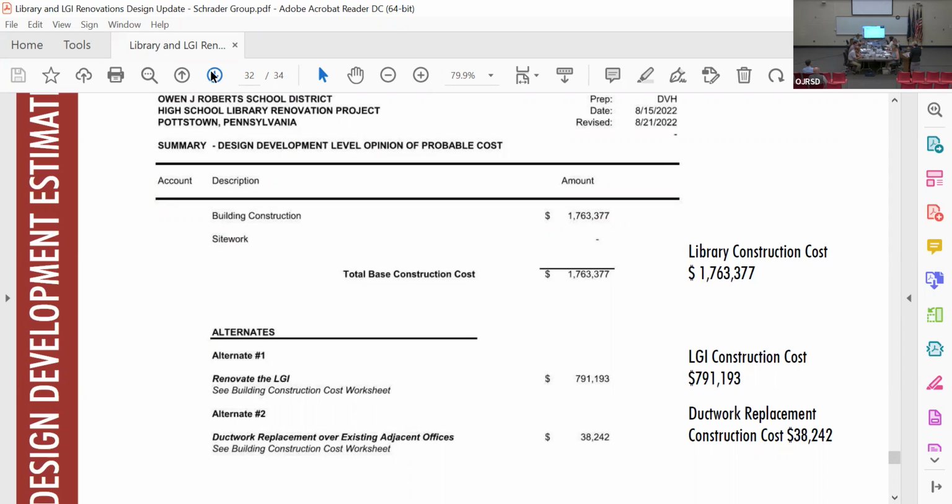Now, as part of this cost estimate, we're basing these numbers on current bids that we have coming in. So we're using cost per square foot based on those recent bids. We're still carrying a 6% escalation. One of the things that we're, I would say, nervous about, to be honest, was where the costs have been going with inflation, with shortages of materials, with timelines.